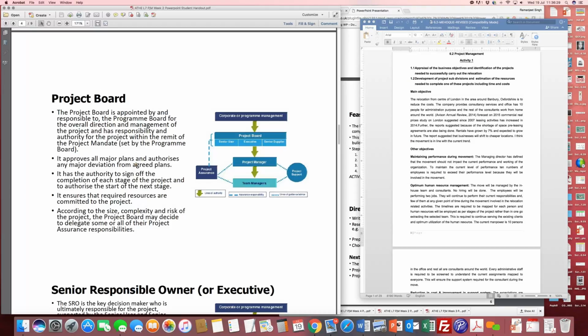When you look at Dubai, for example, the Burj Al Khalifa, which is the tallest building in the world. When that project was initiated by the Crown Prince of Dubai, there were some initial estimates done. They said that the tower would cost 1.1 billion dollars, and they invited bids. But when the project actually started, the costs began to rise. The final tower cost maybe in excess of 1.6, 1.7 billion. But these costs, because they were not small, were approved in principle by the Crown Prince because the state was funding it.